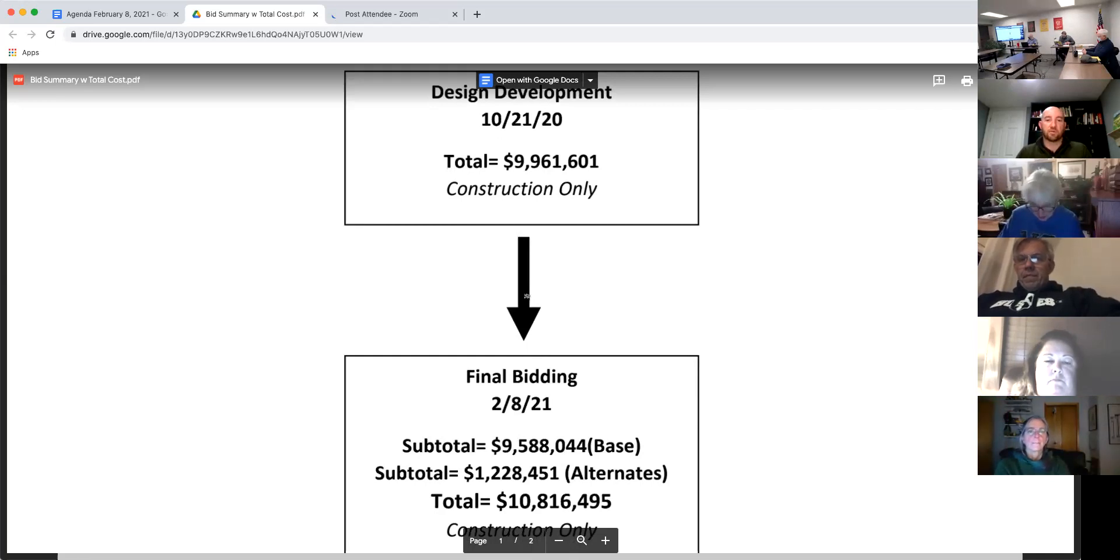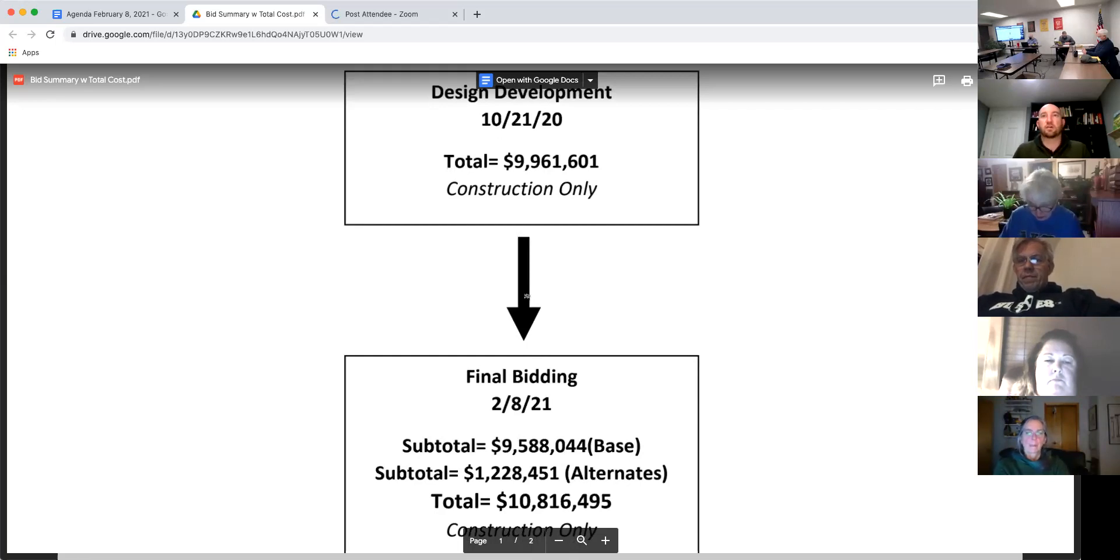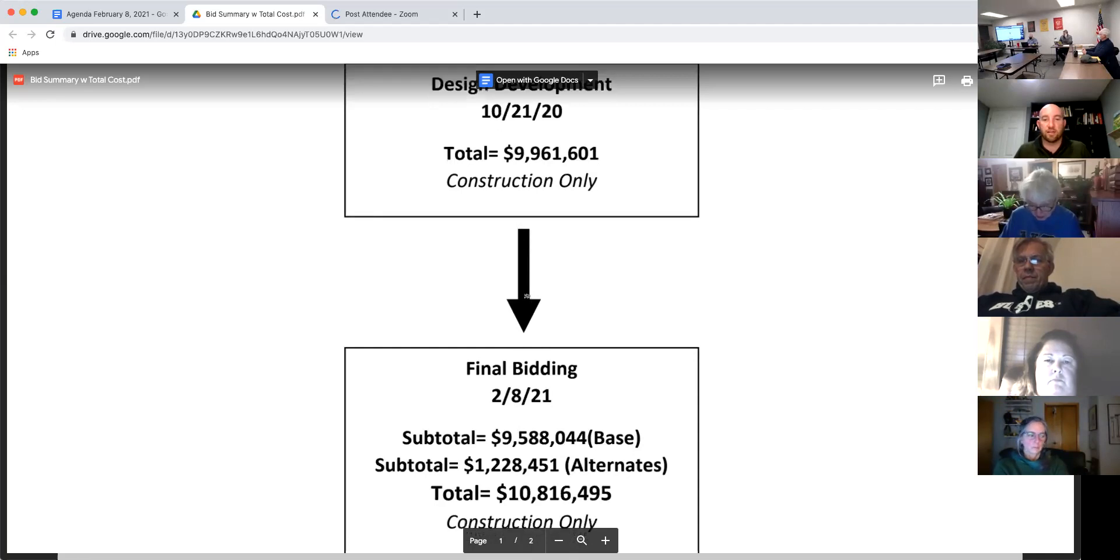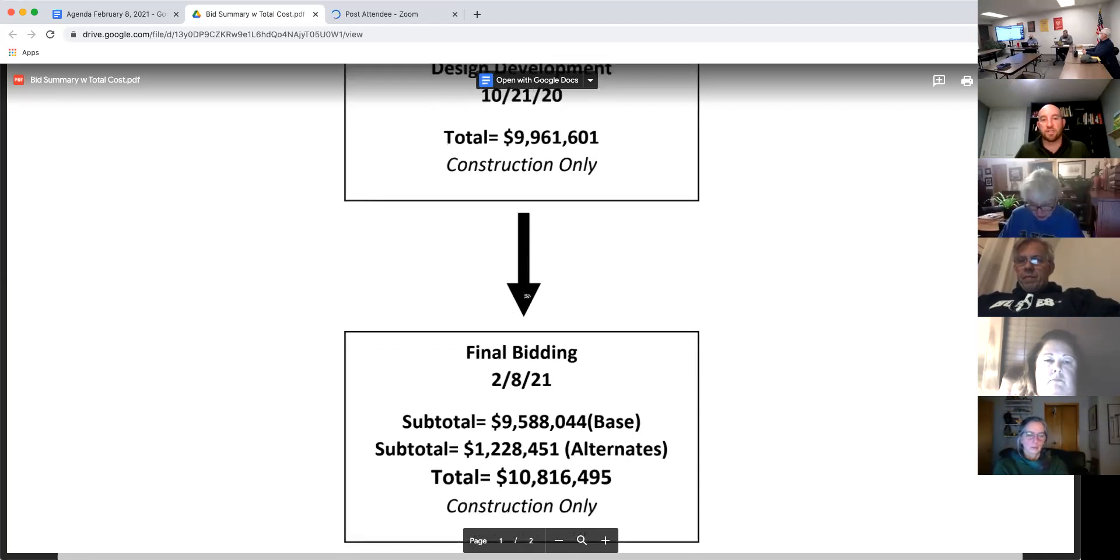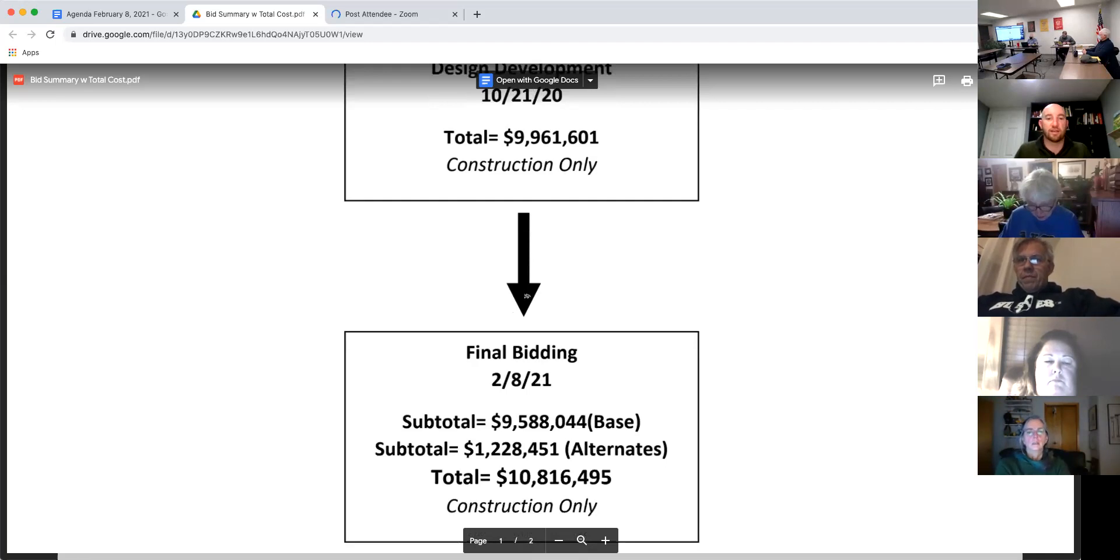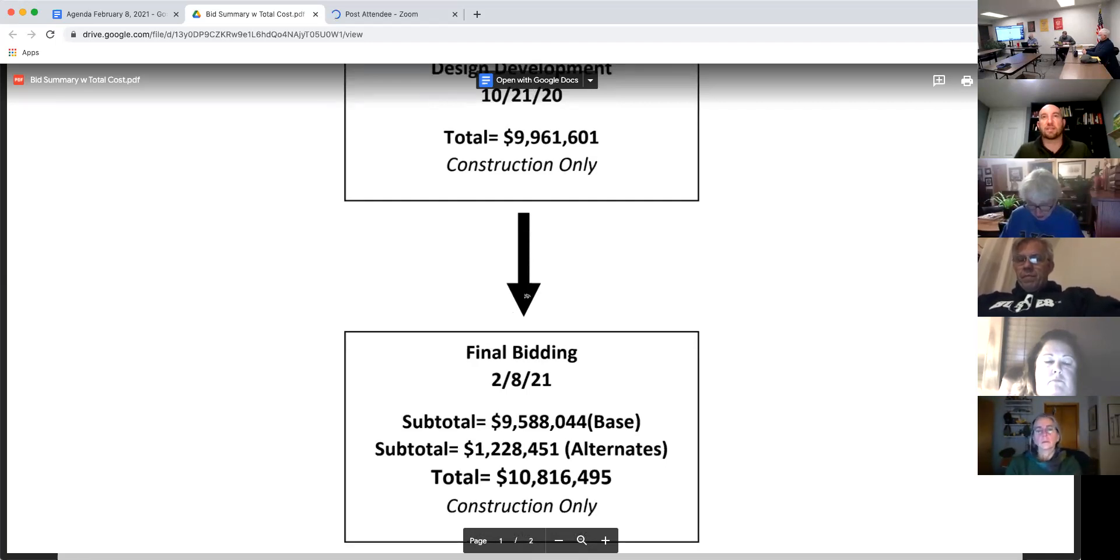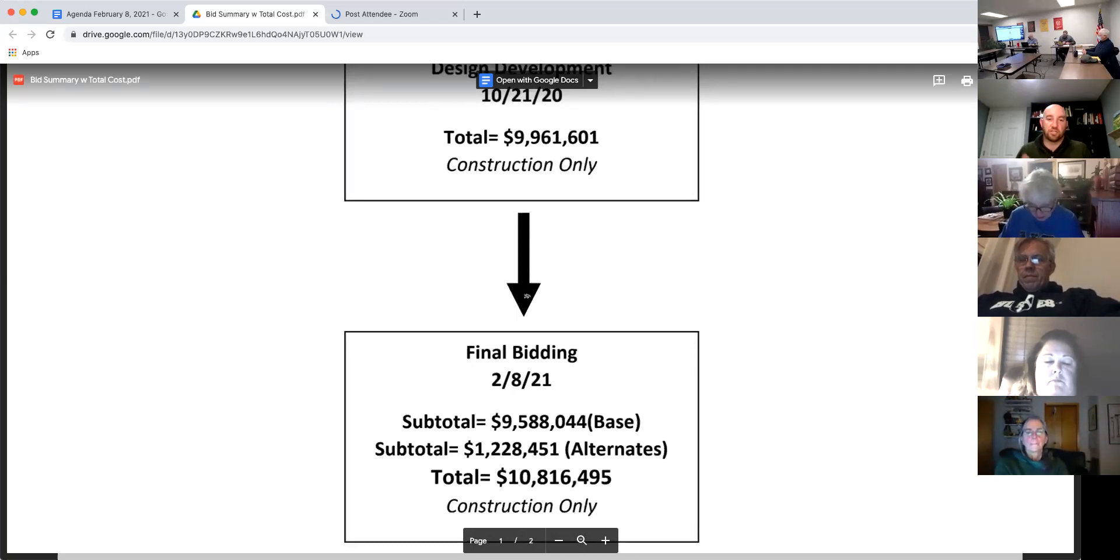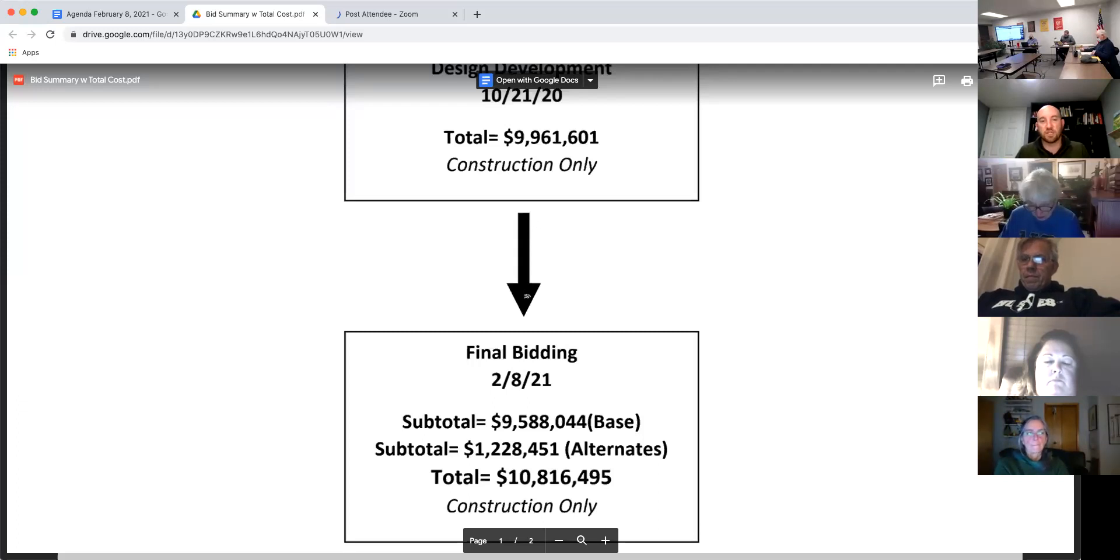And then there was interest in taking all of the alternates as well. I'll let Josh talk if he wants to any more on that. But adding all of the alternates in, we were at a final cost for construction at $10,816,495. And the next sheet really breaks down all of those successful bidders.